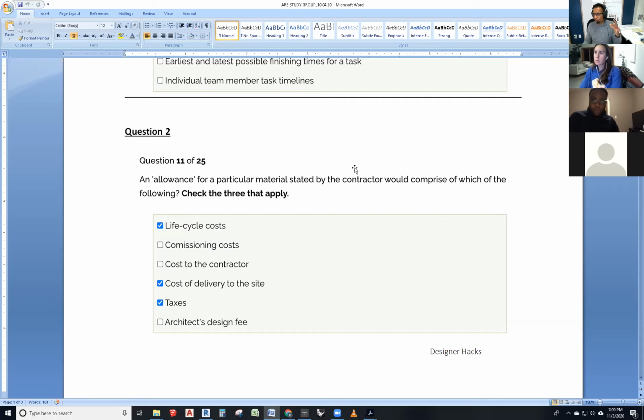So you can't count on the million. You're counting on a little less of the million and saying, okay, there is a 10% contingency. It's got to be included within the total project budget. The allowance could be any amount. Allowances and contingencies are completely different things. An allowance is included within the whole total project budget already. It's something we already know. A contingency is for something we don't know that may or may not happen. An allowance is going to happen. We are going to have an MRI machine. We are going to have pavers.